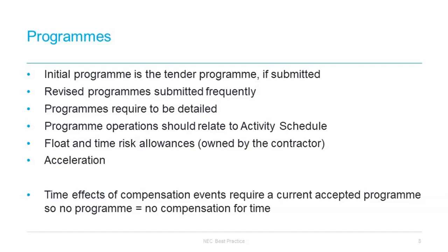And it's important to note that, because if the completion date has been pushed outwards by a compensation event, particularly in a power project, for example, where there's a fixed deadline, that is an issue because the whole project is about a particularly fixed date when perhaps the power has to come online. And a contractor can come under pressure to still hit that original completion date. However, under NEC, unamended at least, there is no requirement for that to occur.